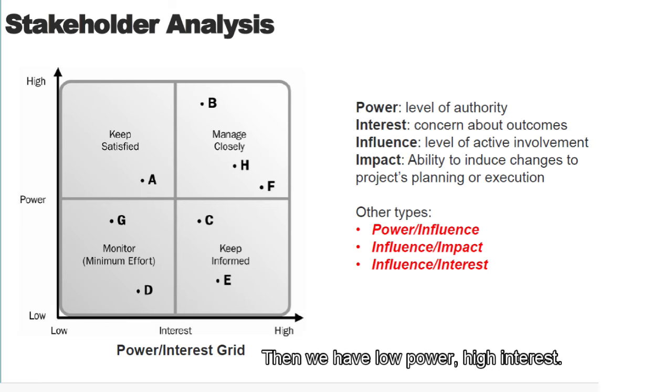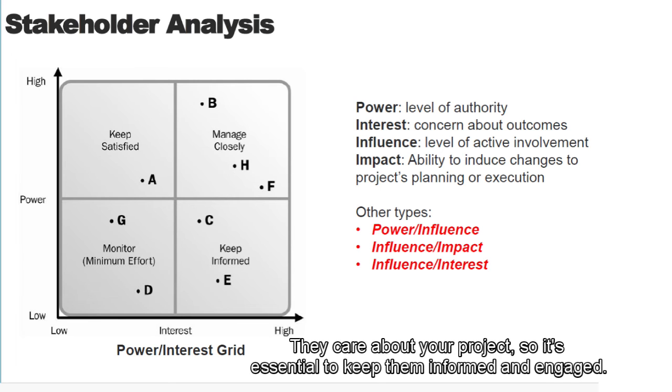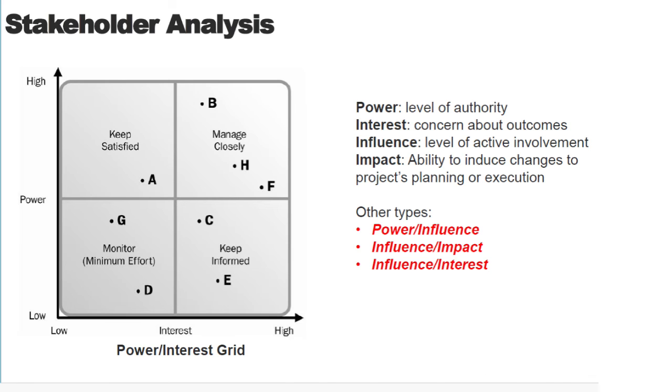Then we have low power, high interest. In the bottom right quadrant, you find stakeholders with a lot of interest, but not much power. They care about your project, so it's essential to keep them informed and engaged.